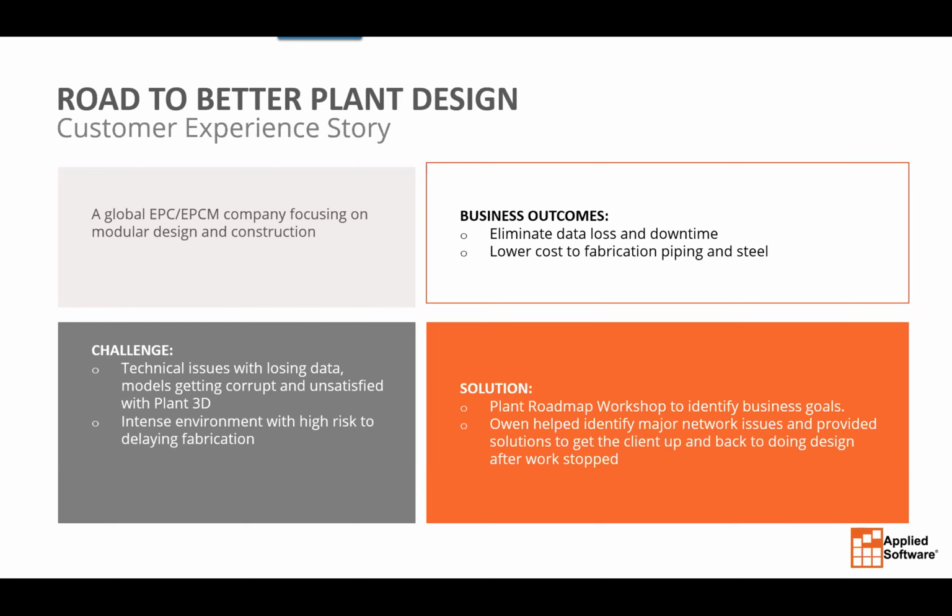Mm-hmm. And then as a result of that, the cost was hitting their fabrication group because the delays were meaning guys are just standing around waiting for work. The project's getting further and further behind. And so when we connected with them, there was an extreme sense of urgency around smoothing out the data issues.